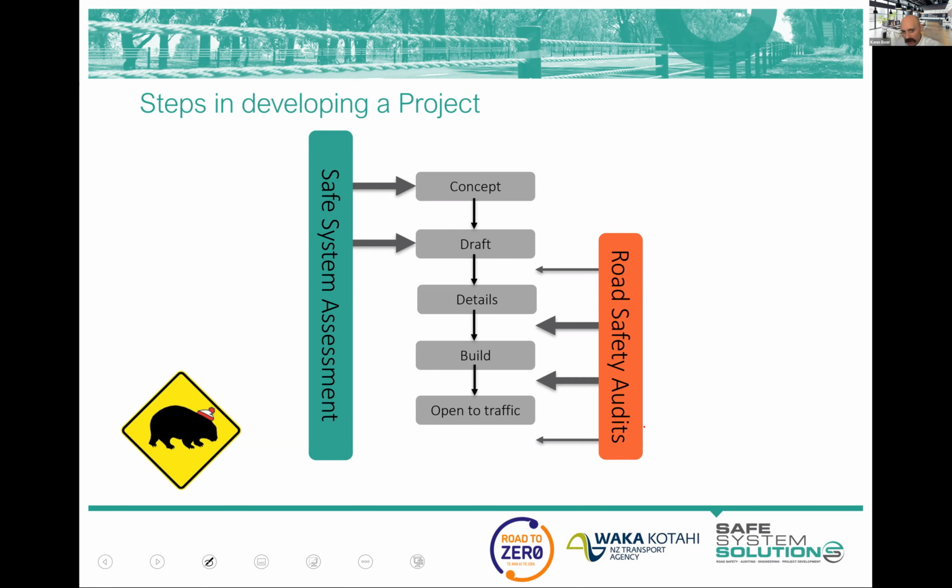When you've got 500 pages of detailed design and you've got long sections, cross sections, drainage plan, pavement plans, signal phasing, and all of that, safe system assessment's not going to work as well. You can do it. The process still works, but the willingness to alter a project's fundamentals is gone. They know exactly how much they've got to spend. They know exactly what their footprint is. They've invested hundreds of thousands of dollars in the detailed design potentially.